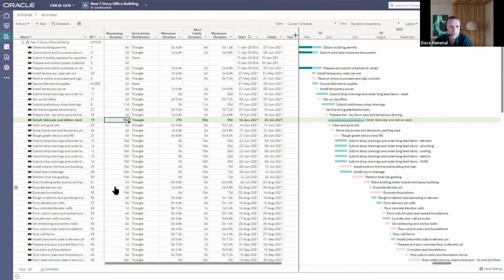Here is where we can capture that activity uncertainty piece that we saw on the slides earlier, really your kind of systemic risk. And I can say that I want to instead have a triangular distribution, and I'm going to go between 27 and 39. Maybe the 30 I'm going to keep as my most likely estimate. But this is one source that is going to drive, as we saw, the variability that we see as we go through the Monte Carlo simulation.